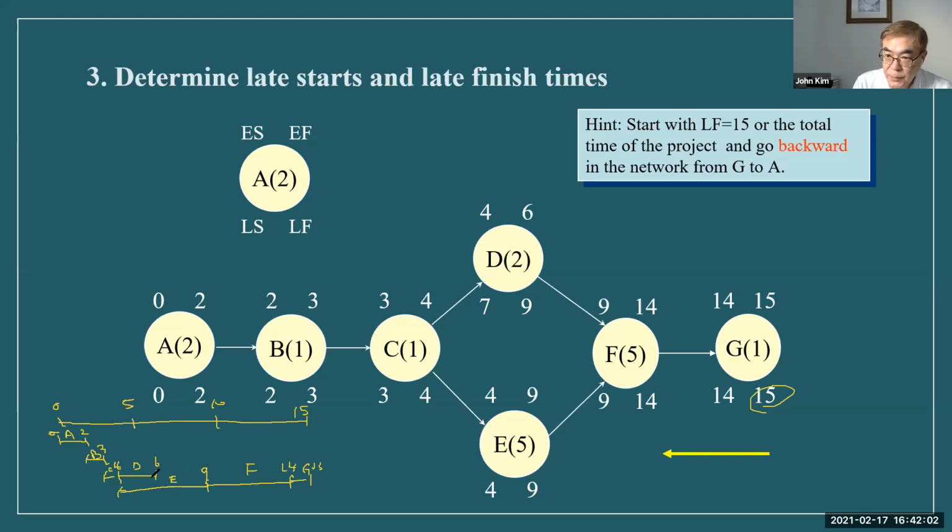Okay, here, others: if A is delayed, then the next one is delayed. If E is delayed, then the next one is delayed like this. But activity D starts at 4, because it takes 2, so it finishes at 6. Start 5, 7; 6, 8; 7, 9; 8, and 10. So if D finishes after 9, like 10, then the entire project is delayed. So this one is not feasible.